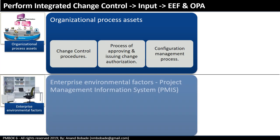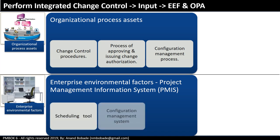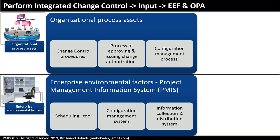Enterprise environmental factors — the most important is the project management information system, which may include a scheduling tool, configuration management system, and information collection and distribution system. A common point of confusion: what is the difference between configuration management process (part of OPA) and configuration management system (part of EEF)? The difference is clear — when you talk about process, it's a methodology, so that is part of OPA. When you talk about tools — your configuration management software, your system — those are at an enterprise or organization level, which is why they are part of enterprise environmental factors.